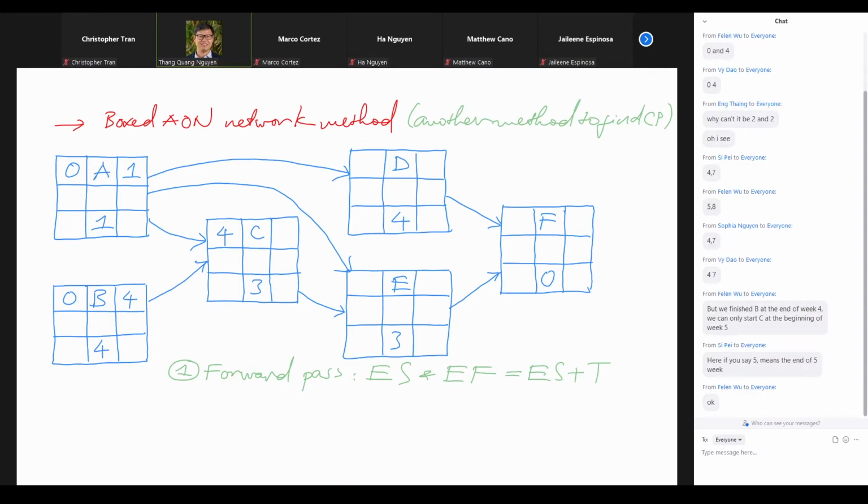Is that good, everybody? Okay, good. All right, so C is started at 4. It takes 3 weeks. Then we would finish C by the end of the 7th week, right? Or like if we start C at 4 p.m., it takes 3 hours.